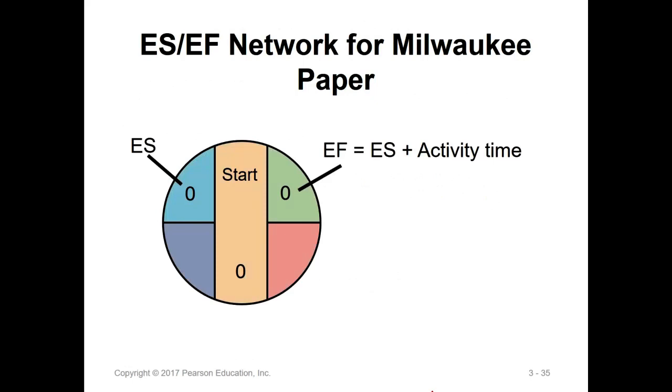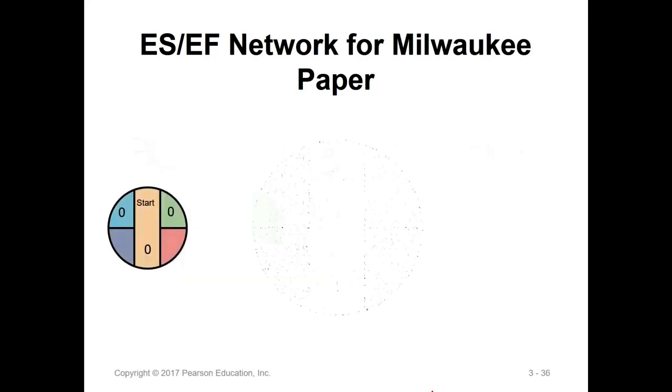So now we put the formula over here: early start is ES, early finish equals ES plus the duration. Duration is here. And in the very beginning, A and B have nothing in front of them. They give a pseudo point as a start point, everything is 0.